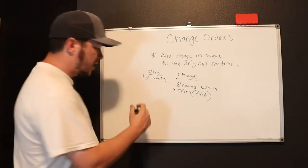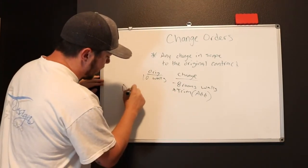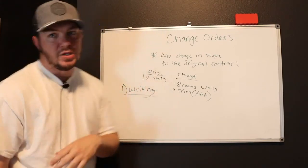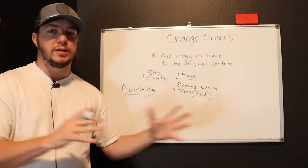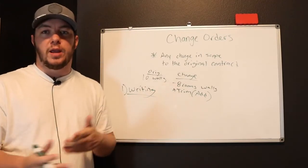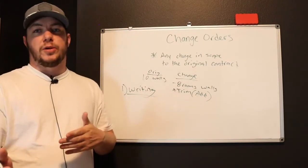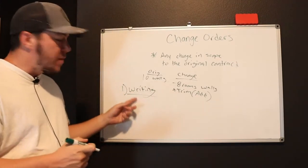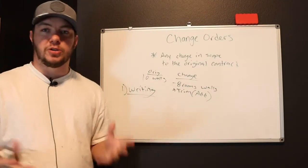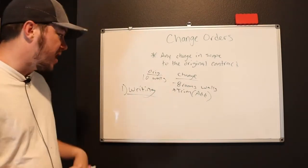So how do you handle it? The first thing you do is get everything in writing. You need proof. So if he calls you and says, hey, I need you to do this or do that, say, hey man, can you shoot me an email with that information? I don't want to forget, or I just want to make sure that we're on the same page. So email me everything that you need done. Be very specific. I just want to make sure we're on the same page. So you have all that in writing.